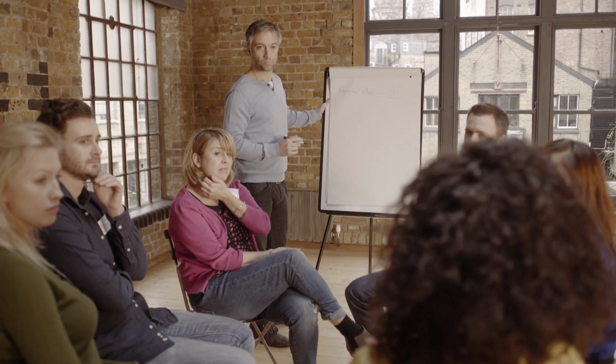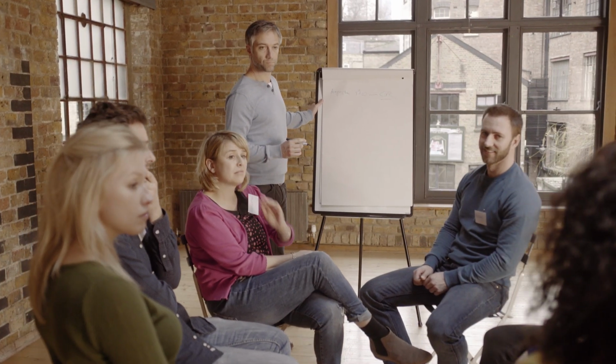So let's say you can have a fruits category, a food cupboard category, let's have those categories in this order. So all these different lovely ideas that are coming out, the project manager takes all these ideas and puts them on a whiteboard, and once all the ideas are collected, you can categorize all the ideas, prioritize, and select which ones you will finally use as the requirements on the project. So these are the various methods you can use under the data gathering technique to collect your requirements.